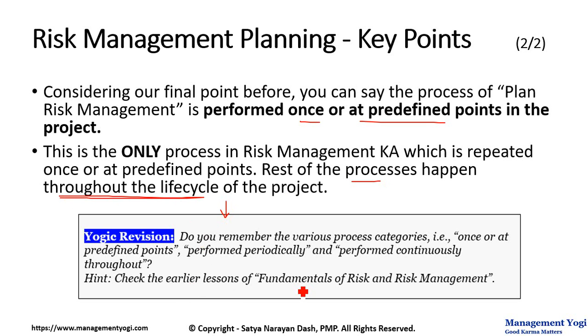So considering risk management, only one process will be performed once or at predefined points, while the rest of the processes will be performed continuously throughout the life cycle of the project.